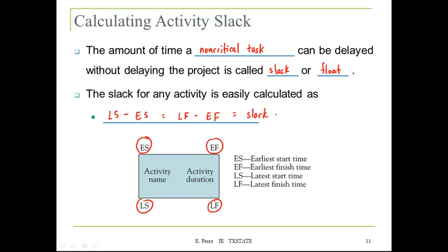So if you have this information, you can subtract the earliest finish time from the latest finish time, or you can use these two to compute the slack.